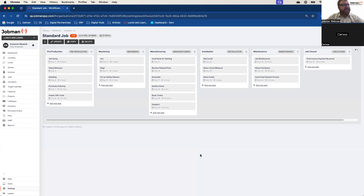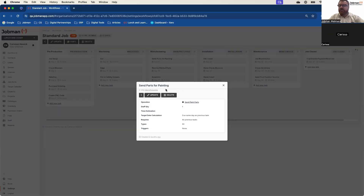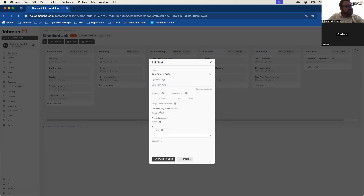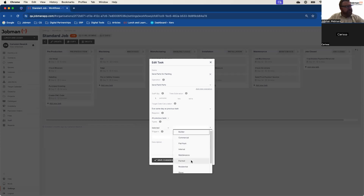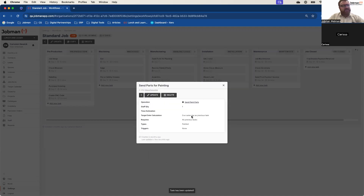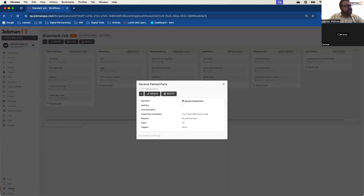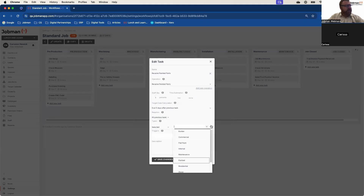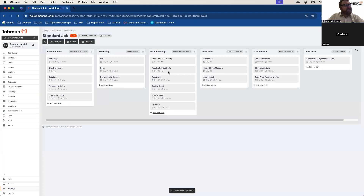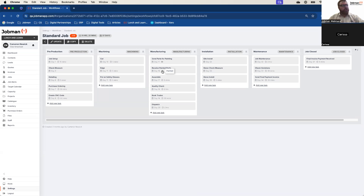Utilizing job types allows us to have those operations come in and out of the flows. So JobMan has the smarts to handle different jobs. I've got a perfect example here: 'sand parts for painting for two-pack doors.' I can set this up and change the type so I only need it if I select 'painted.' Now when I create a standard job, these painting operations will only happen if I've selected the painted job type. In all jobs where I don't select it, I'm not wasting valuable time and allowance in my flow for critical dates such as installation. A little symbol will pop up to show you what these are linked to.